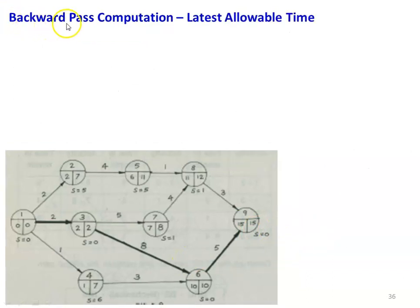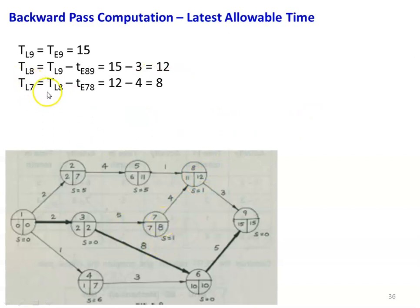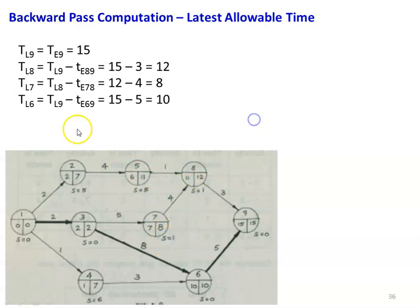Now we take the backward pass computation and calculate the latest allowable occurrence time TL. For the end event, the timing is not given, so we assign TL9 equal to TE9 equal to 15. Then for event 8, there is only one activity emerging from it, so TL8 equals TL9 minus t(8,9) equals 15 minus 3 equals 12. Then TL7 equals TL8 minus t(7,8) equals 12 minus 4 equals 8.